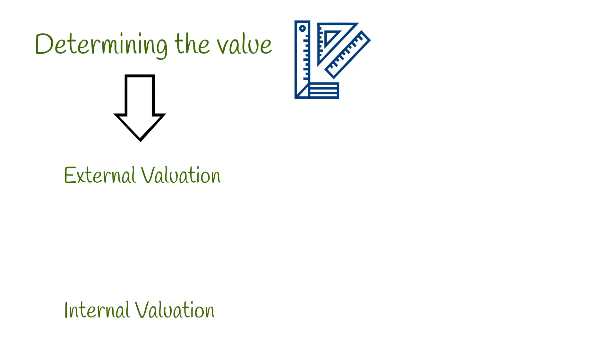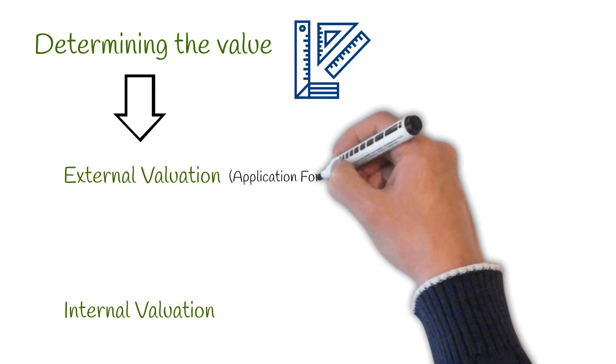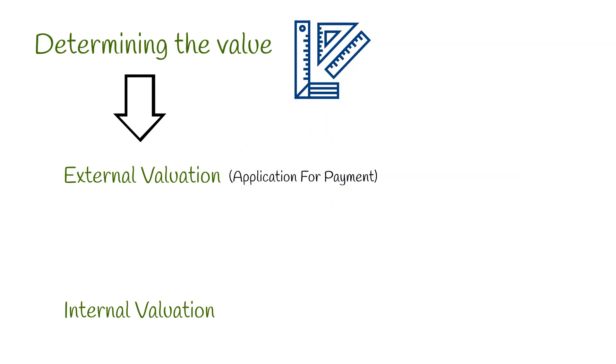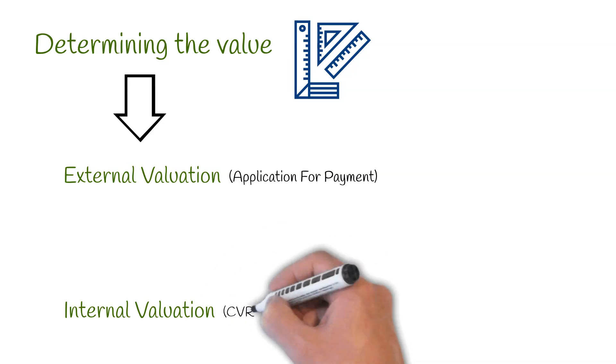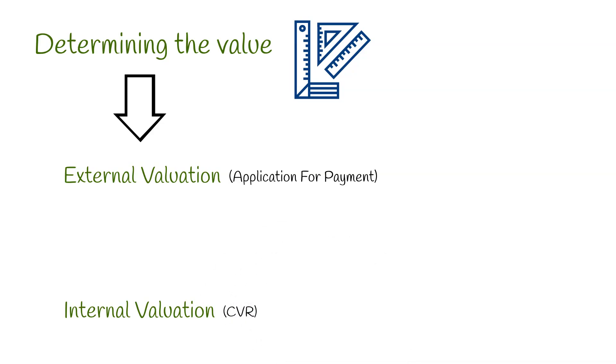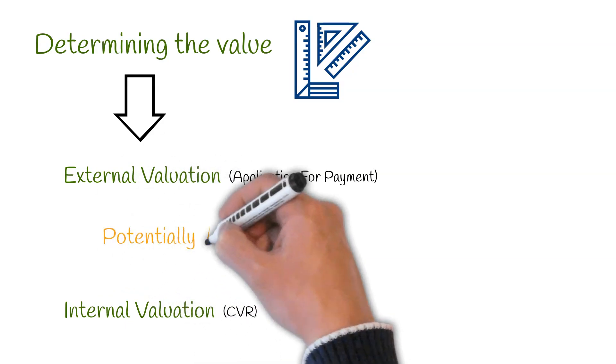The external valuation is the application for payment to the client and an internal valuation is used for CVRs. It is likely that within the external valuation there will be some value which the contractor is aware may be disputed by the client.